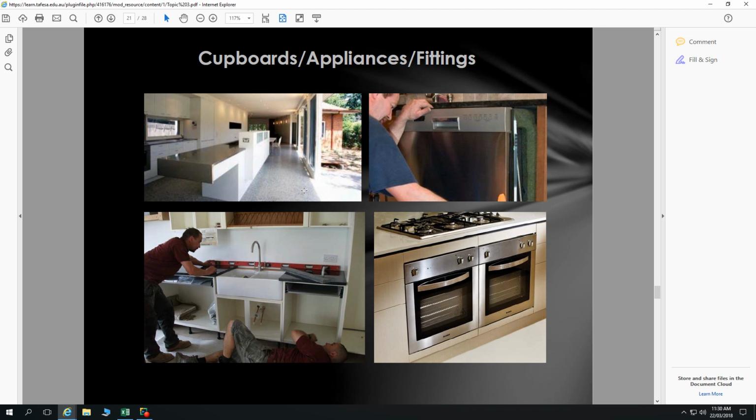Oh, another thing, we had services. So that relates to our air conditioning and heating and so on. This has to happen during our electrical and plumbing first fix stage as well. When we've got our frame happening, you typically want that to happen when your roof and your brickwork are in place as well, to keep weather off that equipment. But it will start happening at about that stage.